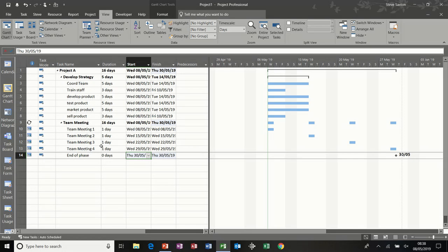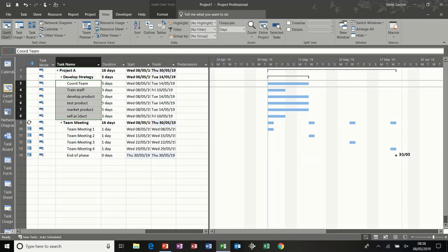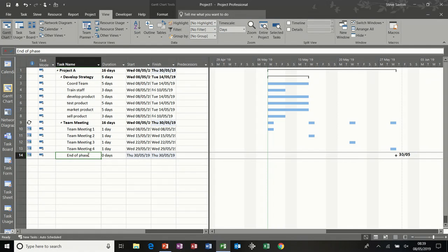Project likes to schedule things based on durations and links. So if you intervene and change a date, it then becomes, in project terms, slightly more important than any of these tasks in this example, because we haven't changed any dates. Okay, so that's the first stage typed out.